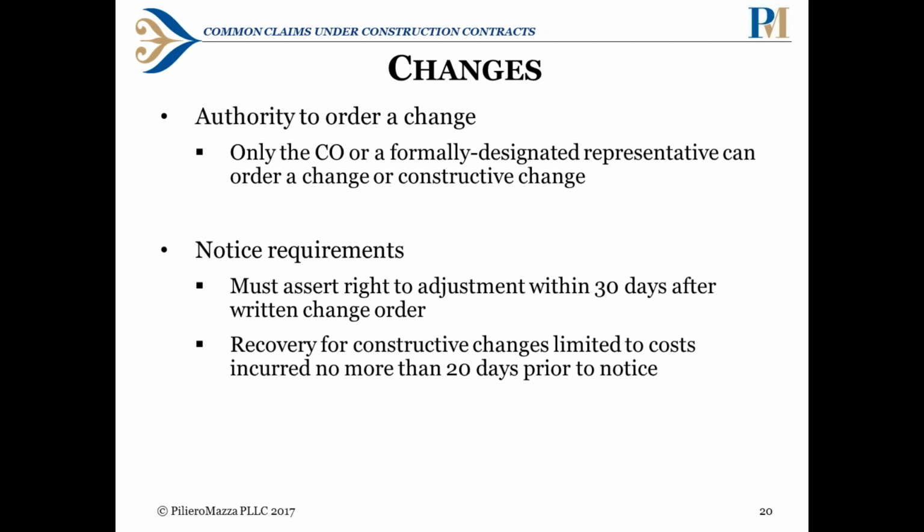not to agree to perform assuming that you'll be paid if the change in performance somehow impacts your costs. Not just assuming that those costs will be covered whenever any personnel directs you to make some change. So you need to make sure that the change is actually authorized by the appropriate personnel.